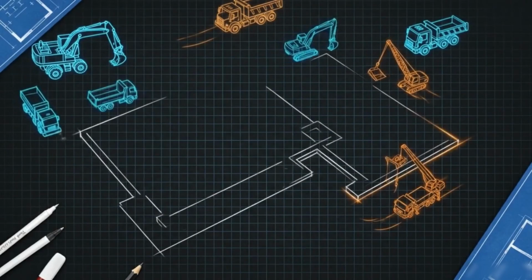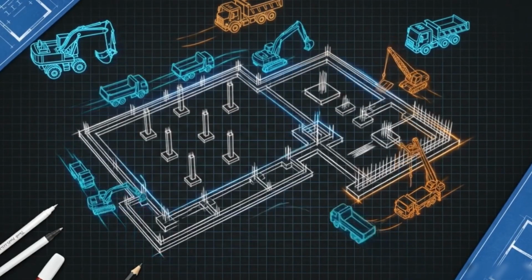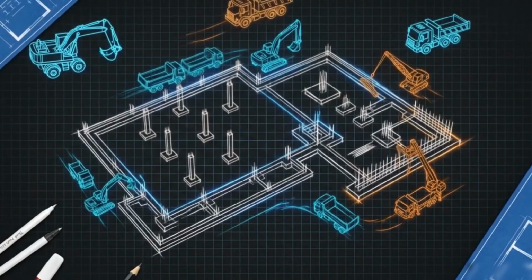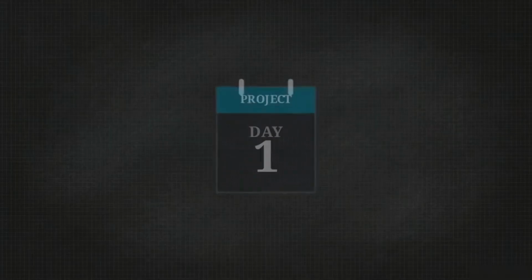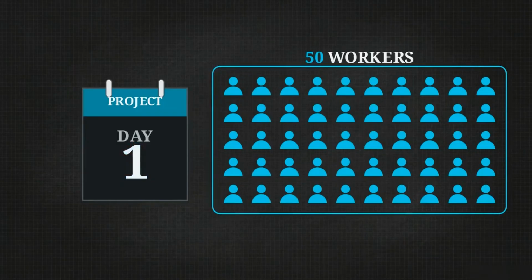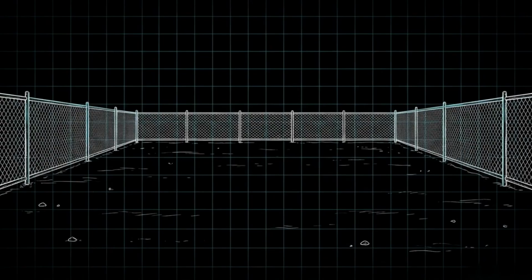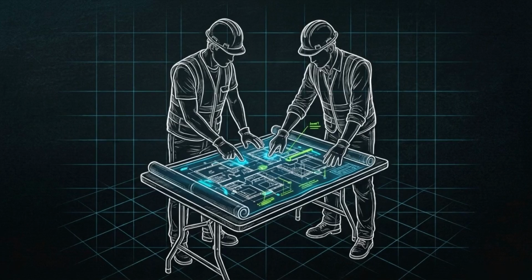Imagine you are hired to construct a massive new shopping mall, and you have exactly 10 months to build it from the ground up. You might think the safest plan is to hire 50 workers on day one and keep them on the payroll for the entire 10 months. But look at what happens in month one. The site is an empty dirt lot. The only work available is for a few architects and project managers drawing up blueprints.